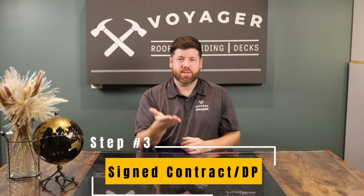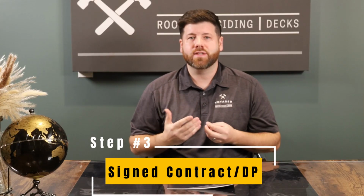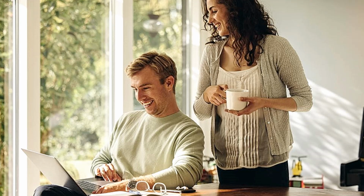Step number 3 in the process is the signed contract and down payment step. So this is where you have now made your final decision on the overall product, color, and look of your home, what you want it to look like for that finished product, and we then go ahead and type up the contract with the exact specifications of your design decisions. We can then send that contract document directly to your email where you can e-sign it, which makes it nice and simple and easy from anywhere you're at to sign that document and finalize it. At that time, we then ask for a 50% down payment, 50% of the project, to then order the materials and get your project scheduled with the production team.